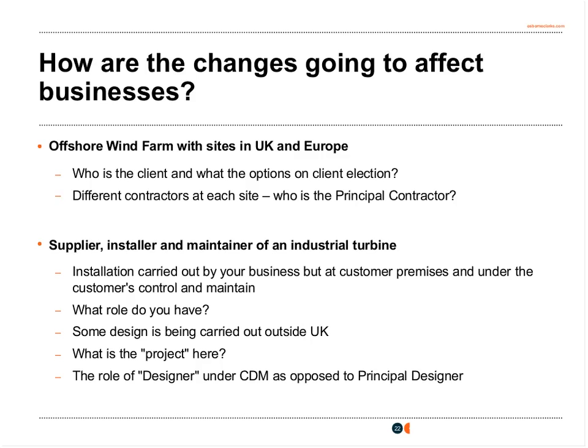So that must be borne in mind when deciding how to structure this sort of project. Another consideration, and another option for the client, is if the client has sufficient in-house experience to do so, the client may be able to take on the role of principal contractor for the overall project and take on the obligations that that would involve.